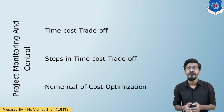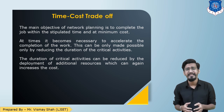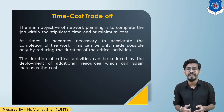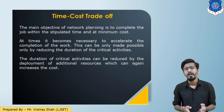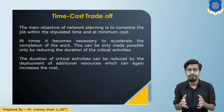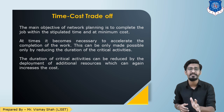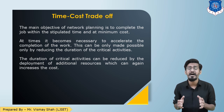In our construction industry, our aim is to complete the project within the stipulated time and minimum cost. But in certain situations we need to complete the project as early as possible, or we need to accelerate the project. So to reduce the duration of the project we may deploy extra resources, and we need to focus on the duration of the critical activities.